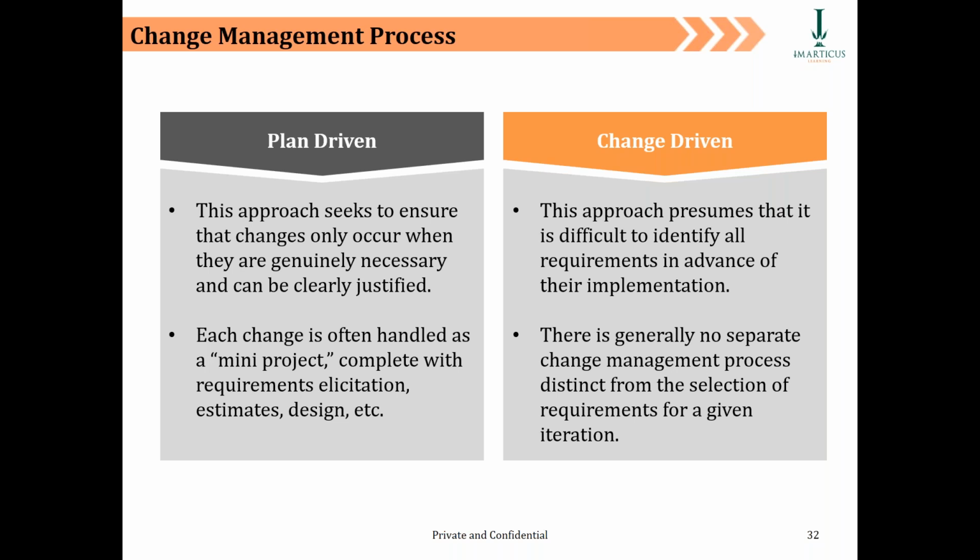So in a waterfall, you plan everything. You say, all right, there are likely going to be 20 requirements, and those 20 requirements are likely going to be implemented by maybe 1,000 man days. That's the broader scope of my project. And yes, changes are inevitable. So some changes beyond our control will genuinely occur, and we have to take them into an addendum scope via the change process. So that's the plan driven part.